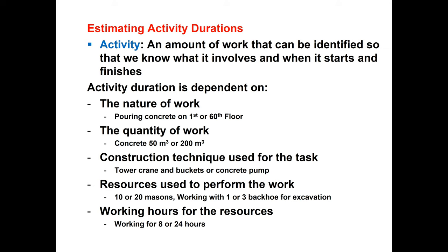Now, activity duration is dependent on many things. Some of the things we are going to discuss: the nature of the work, the nature of the project. Like pouring concrete, whether we are pouring concrete on the ground floor, or on the first floor, or on the 60th floor. The nature of work depends upon the complexity of the work, so duration will change.